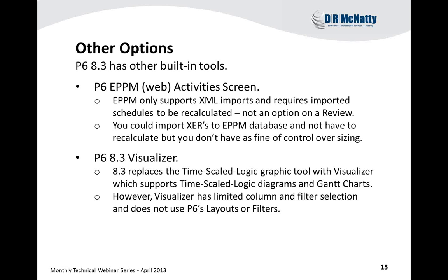Now, I could import XERs to an EPPM database using P6 Pro without having to recalculate, and I could use the web activity screen. However, I still don't have as fine a control over sizing and things like that that I have with the Windows-based P6 Pro.